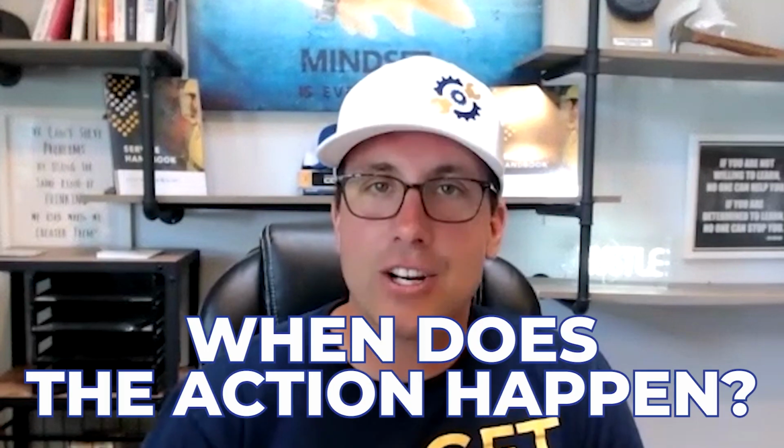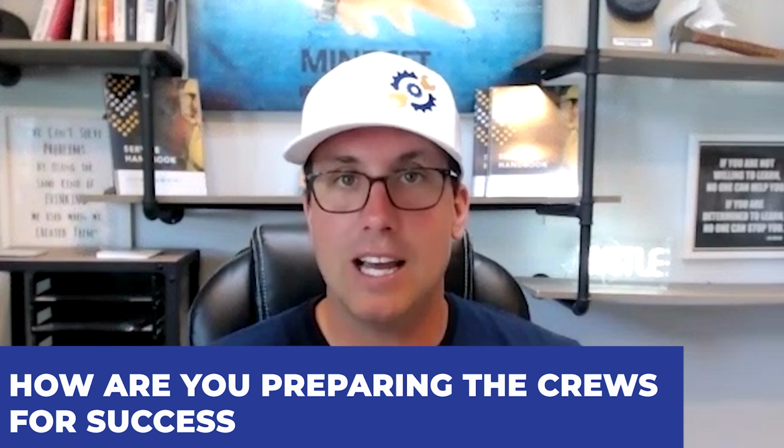Figure it out, right? What is the action? When does the action happen? And who's doing it? Those are the 3 questions that you need to ask. So when you talk about getting a contract, let's just say this morning is when we're starting the job. How are we preparing the crews for success? Are the materials set up? Do they have their own bay where they can come in and get the materials? Are they getting the materials on Monday and they're already on the truck? Then they start the day off at 7 a.m. They punch in for travel at 7:01. You're not paying for them to come back to the shop or drive to a supply house. All of that is lost profitability.